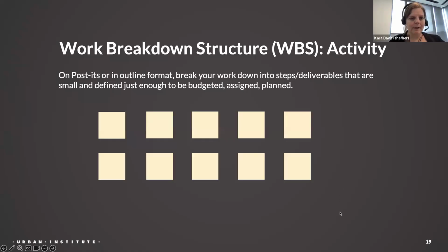So this one, again, take one of your deliverables and just map out the steps quickly, or the things that it would take to make that thing happen. Don't forget to put in planning activities and what you might need to do after you launch the project. So any sort of wrap up or debrief, as Kashua has an example of.